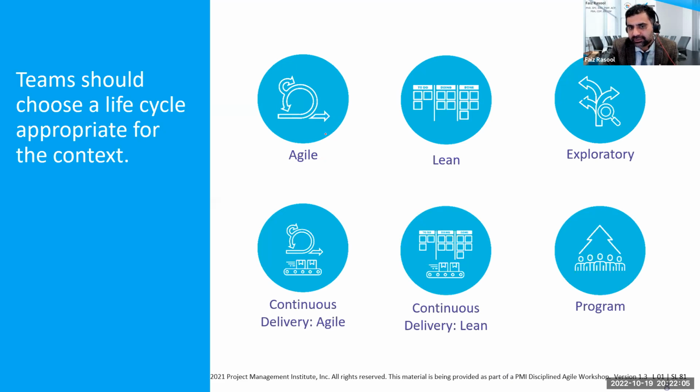2 of the life cycles are from Agile and Lean. These life cycles are very good when we have project-based funding, instead of funding to our products or our value stream. It is very common that we get project-based funding, one project from its start till end. When our teams are organized around projects, though not highly recommended, the issue is each time a new project comes, we form another team. No, we really want long-standing stable teams.